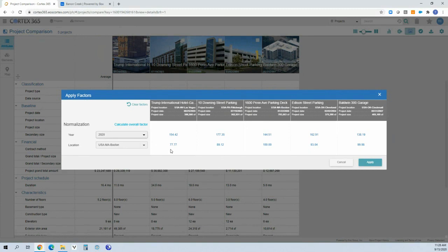The usual suspects of RS Means, city cost index, and historical cost index are pretty straightforward, inexpensive, if not free. However, you can contribute really with any location and time-based factors you desire. Future years can be represented by escalation amounts, again, based on any economic data you may want to reference internally or outsource. Location lists are available, as you can see, by a dropdown.